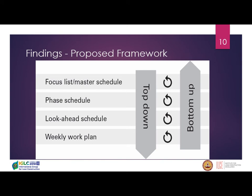We developed two figures. The first is about the plan level. Some uncertainties come from the higher level — identified in the master schedule but needing to be handled at the lower, operational level. So it's a kind of top-down process. Some uncertainties can be handled at the level they are identified, and some identified at a lower level need to be handled at a higher level. So it's a mix of top-down process, bottom-up process, and handling at the level they are identified.